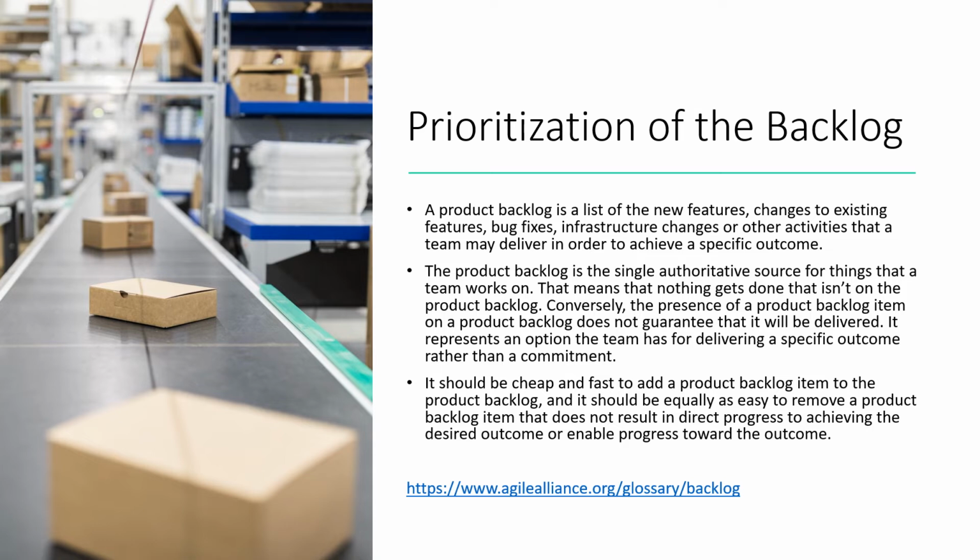Regardless of what the reason is for the prioritization or the method used to establish the rank order, a key feature of Scrum is that priorities can change regularly. Priority is assessed and then reassessed at the start of each sprint, so about every 3 to 6 weeks. This means projects can constantly be adapting to external forces. It's the product manager's responsibility to keep up with these changes.